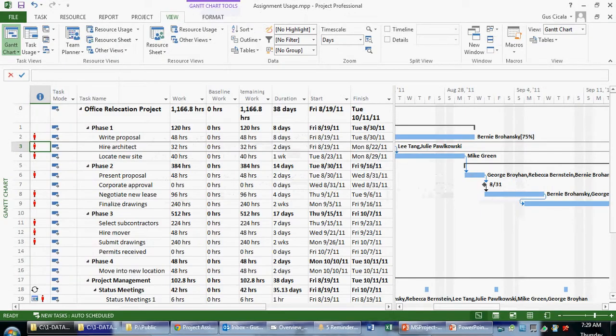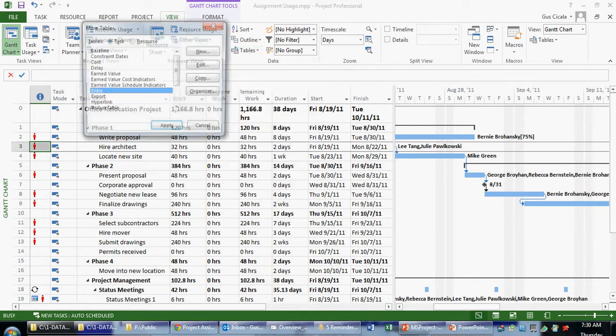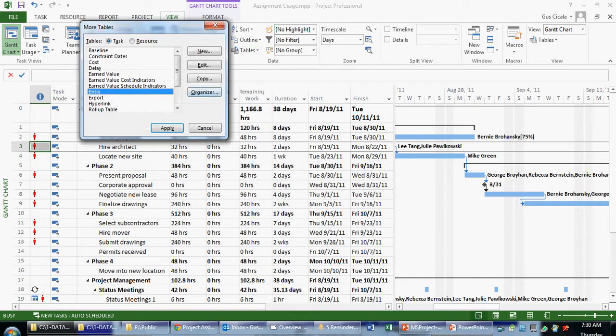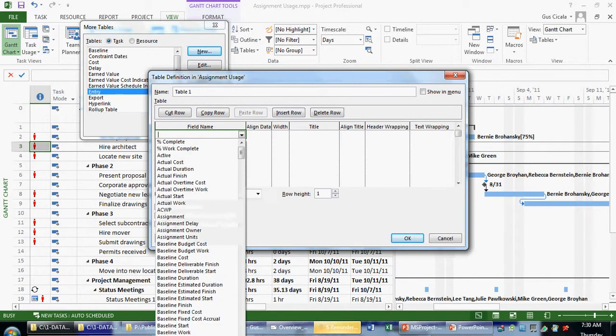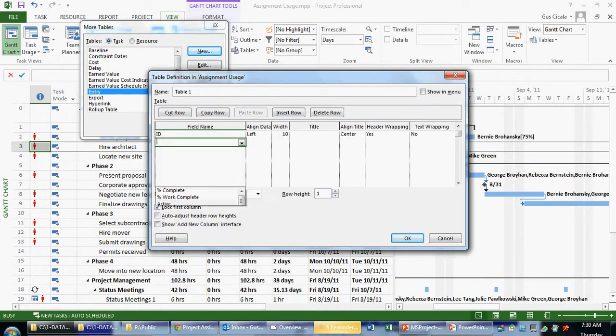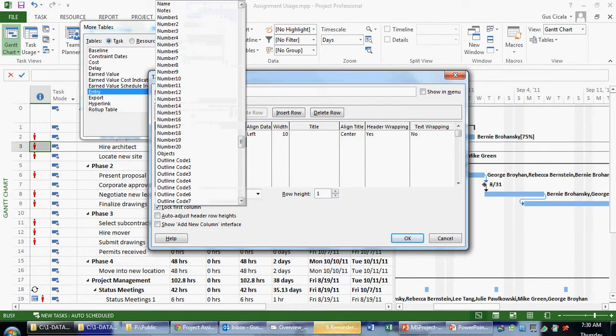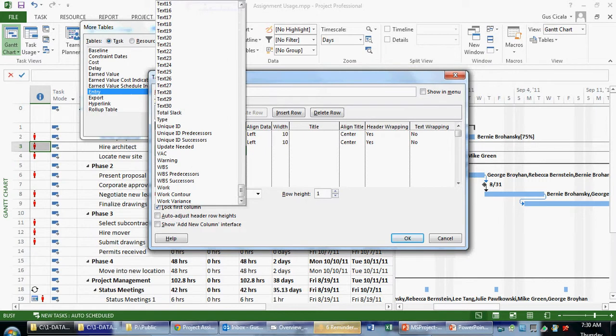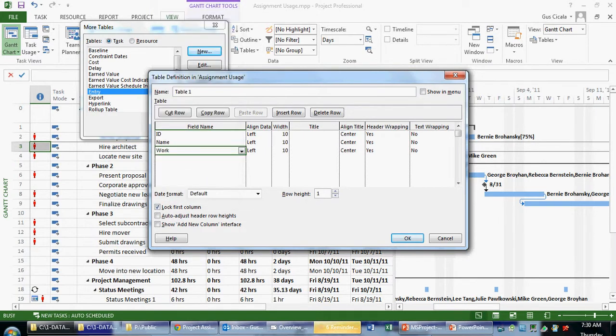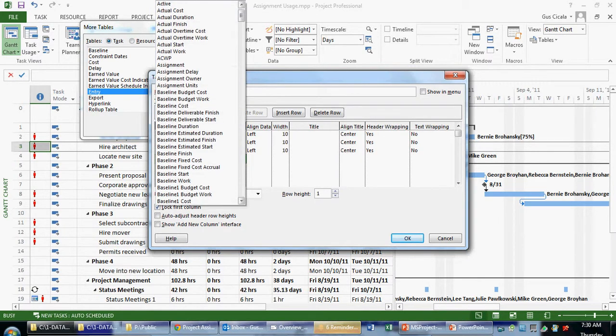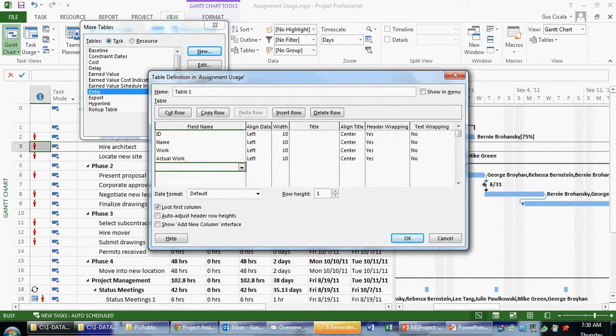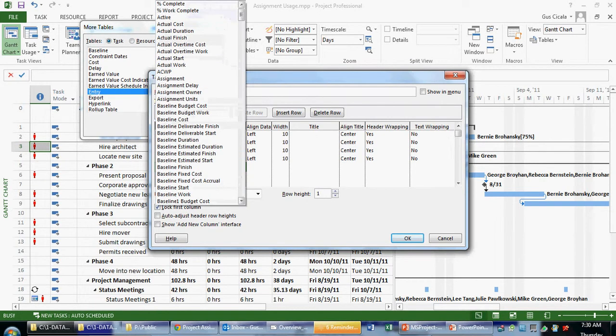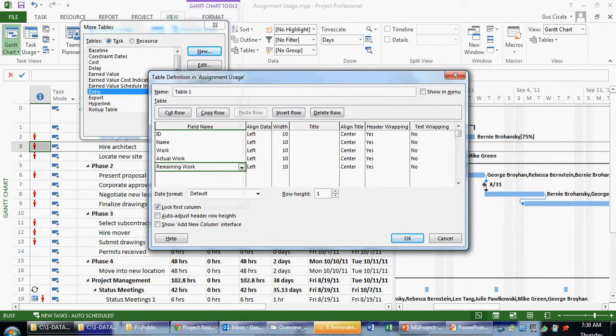So how would I do that? If I wanted to create a brand new table, I can choose Tables, More Tables. I can click New. And here, I can choose all the fields I want to choose. So I might put in the ID column, which is a common table field. I can put in name, which is what task name is actually called. I can now start to add my work field. Maybe my actual work field. I can put in my remaining work field.